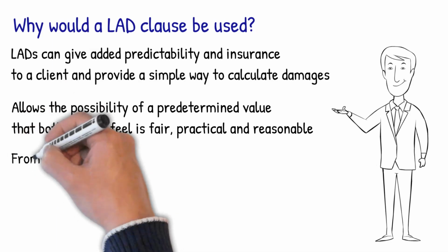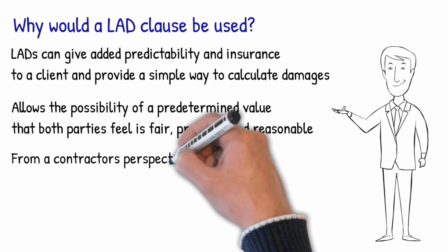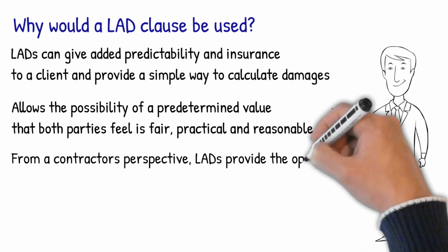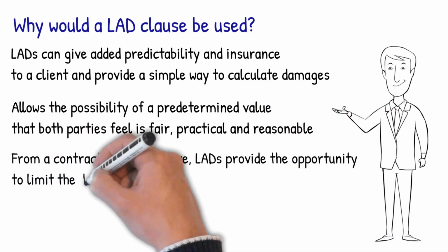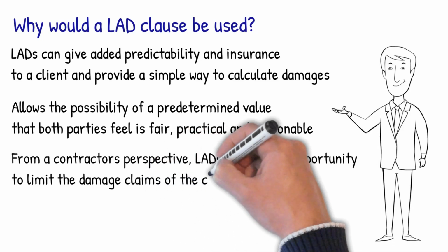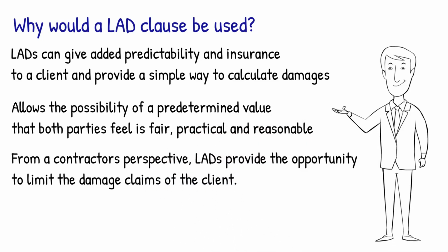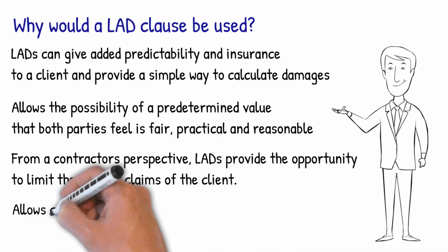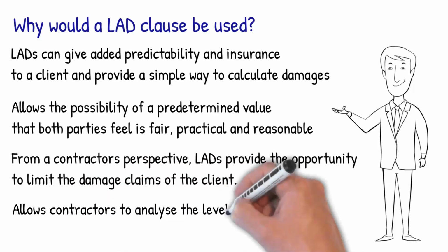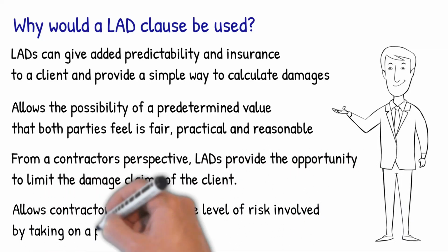From a contractor's perspective, the liquidated damages clause allows them the opportunity to limit the damage claims of the client if a dispute should arise over the delay of a project. Also, it provides them with the opportunity to analyse the level of risk involved by taking a contract and to plan appropriately.